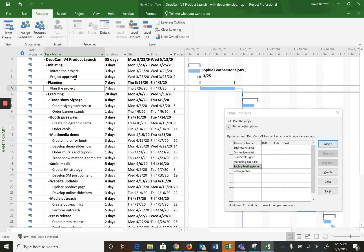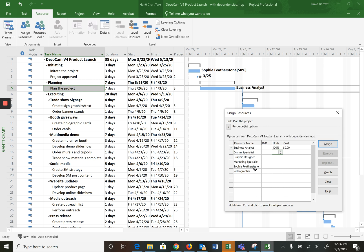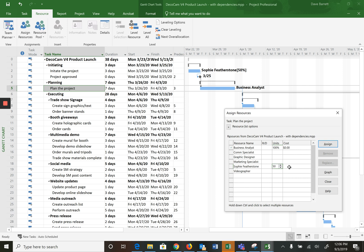Plan the project is a little different because Sophie is assigned for 50%, but also the business analyst is assigned for 100%. So that's a little trickier. Well first of all, there's the business analyst and we will assign 100%, and then Sophie we will assign to be 50%. You can see she moves up there.